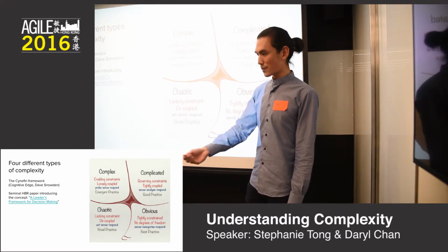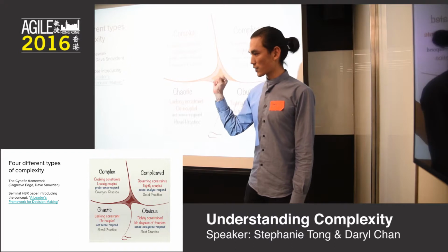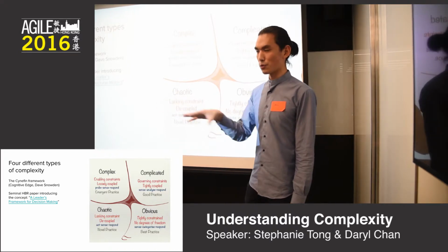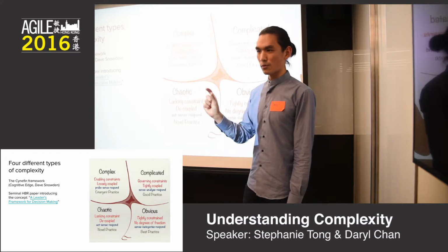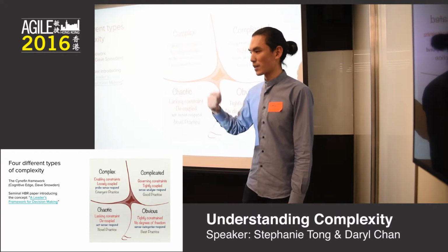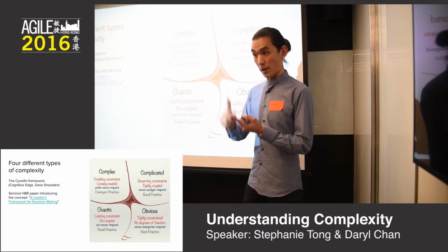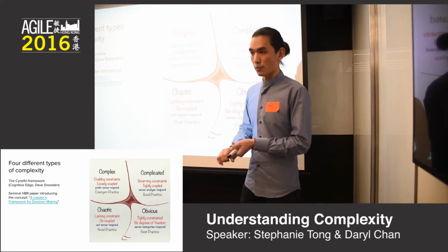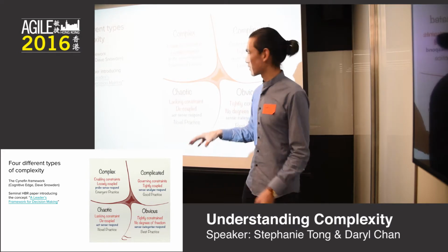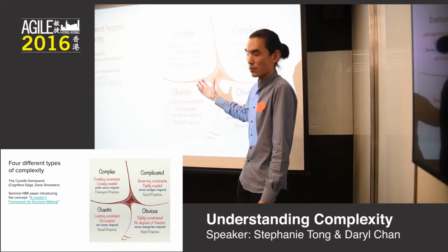Set up a first sprint, and then, okay, we're going to explore these 5 areas to try and reduce our risk, just like Steph mentioned there. And set them up so small that they're safe to fail, right? If an experiment fails, you're not damaging people, you're not damaging your company, you're not damaging the success of your product. Really safe to fail experiments.